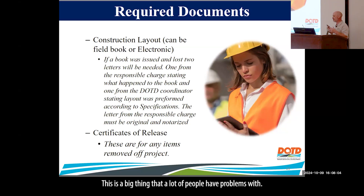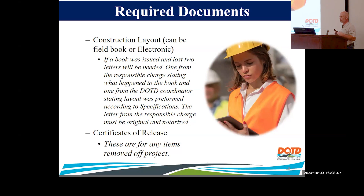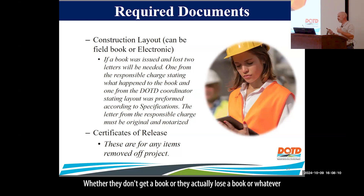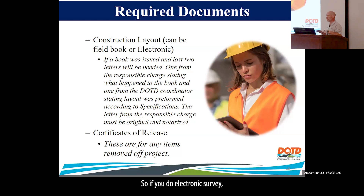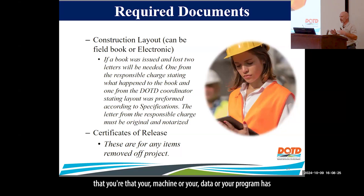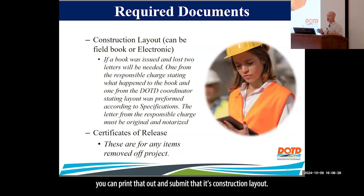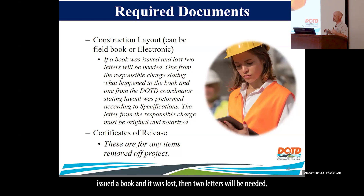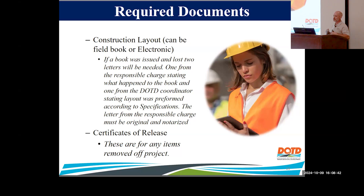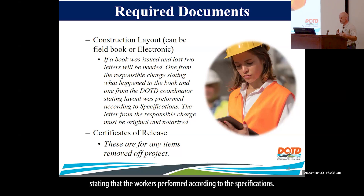Construction layout is a big thing a lot of people have problems with — they don't get a book, they lose a book, or whatever it may be. If you do electronic survey, you can submit a printout from your machine or program as construction layout. We do have a policy that if you were issued a book and it was lost, two letters will be needed: one from the responsible charge stating what happened, and one from the coordinator stating the work was performed according to specifications.